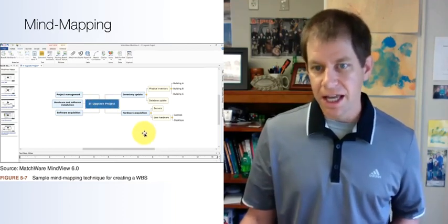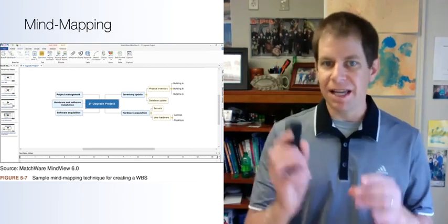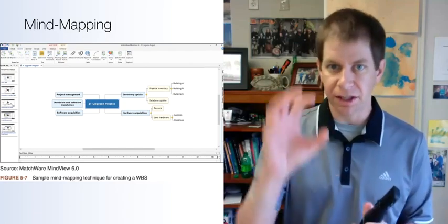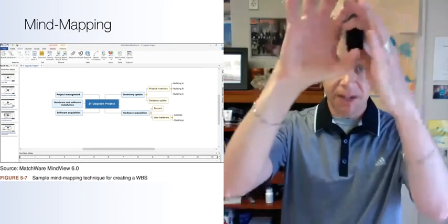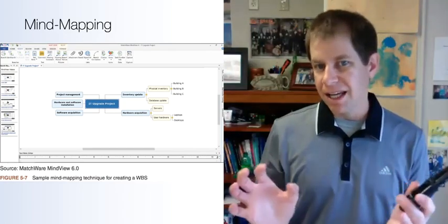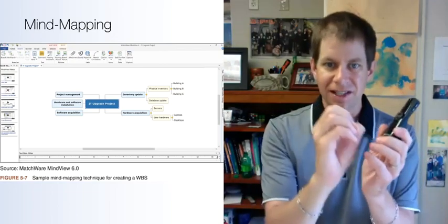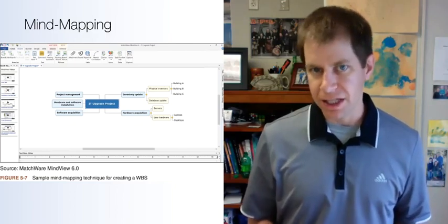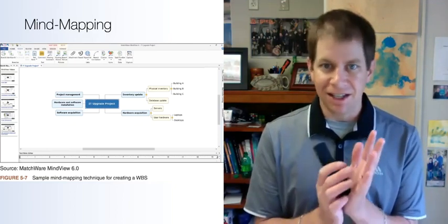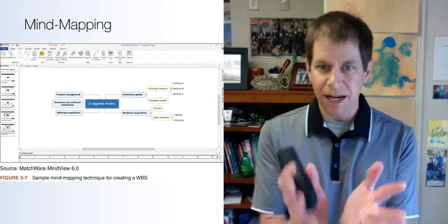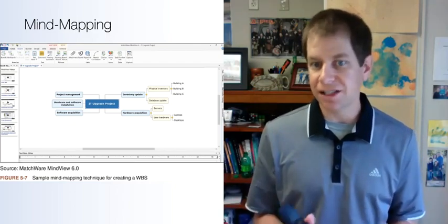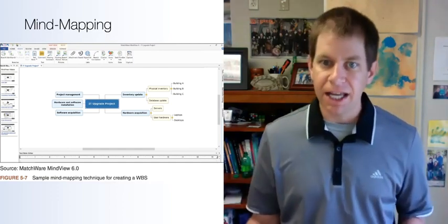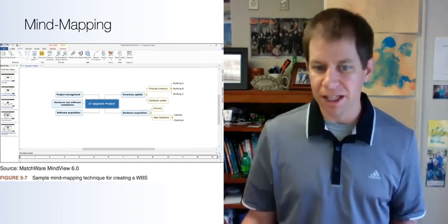And it's the same idea as making it from a top down, where we had those examples earlier where there's literally an item at the top that's been broken down and then broken down. It's taking that same thing, only starting in the center and working your way out. I mentioned a while ago, don't overthink this. Mind mapping is an example of that. Don't look at a mind map and think, I don't understand any of this. Really, it's just taking the work that needs to be done and mapping it out and breaking it down. And this happens to be another way of doing it visually.